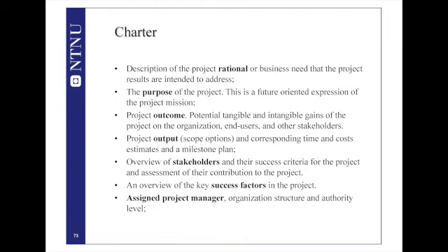This document simply describes how important the project is for the project owner. It should be written by the owner. And in this document, the project owner should describe the rationale, the goals, and provide important guidelines for the project organization about the priorities of this project.